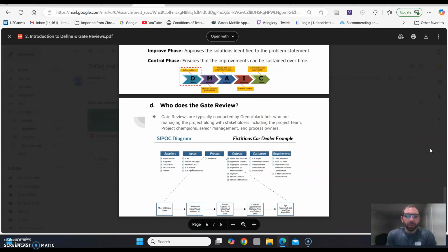Part D. Who does the gate review? The gate reviews are typically conducted by the green belt or black belt who is managing the project, along with the stakeholders, including the project team, project champion, a senior manager, and process owners.